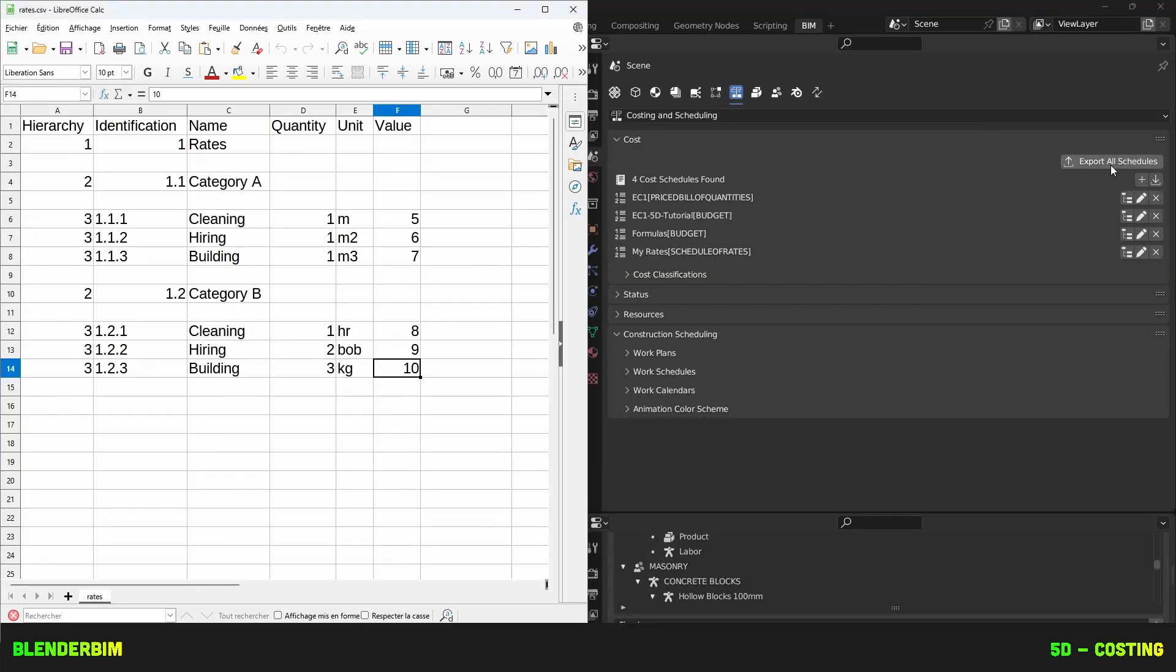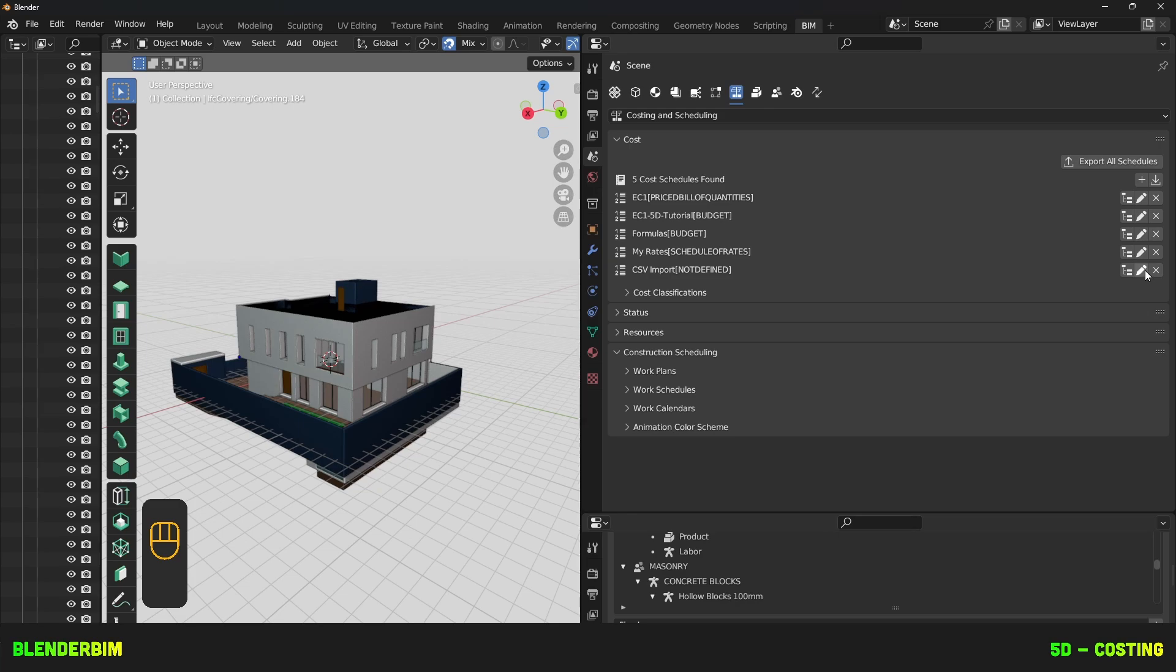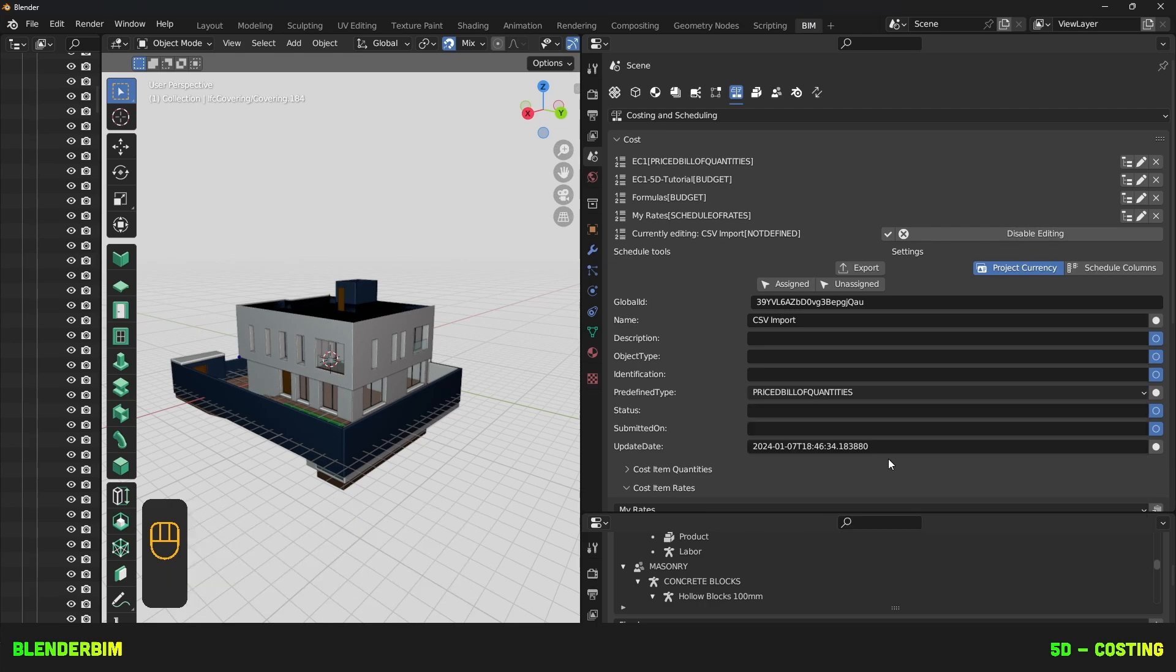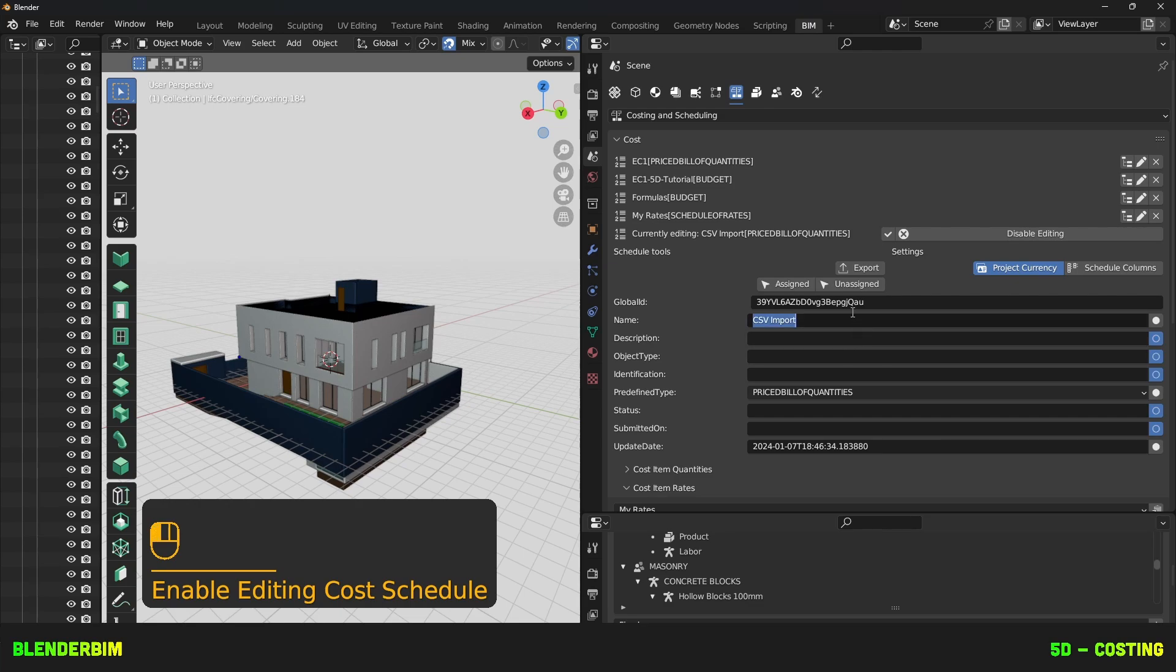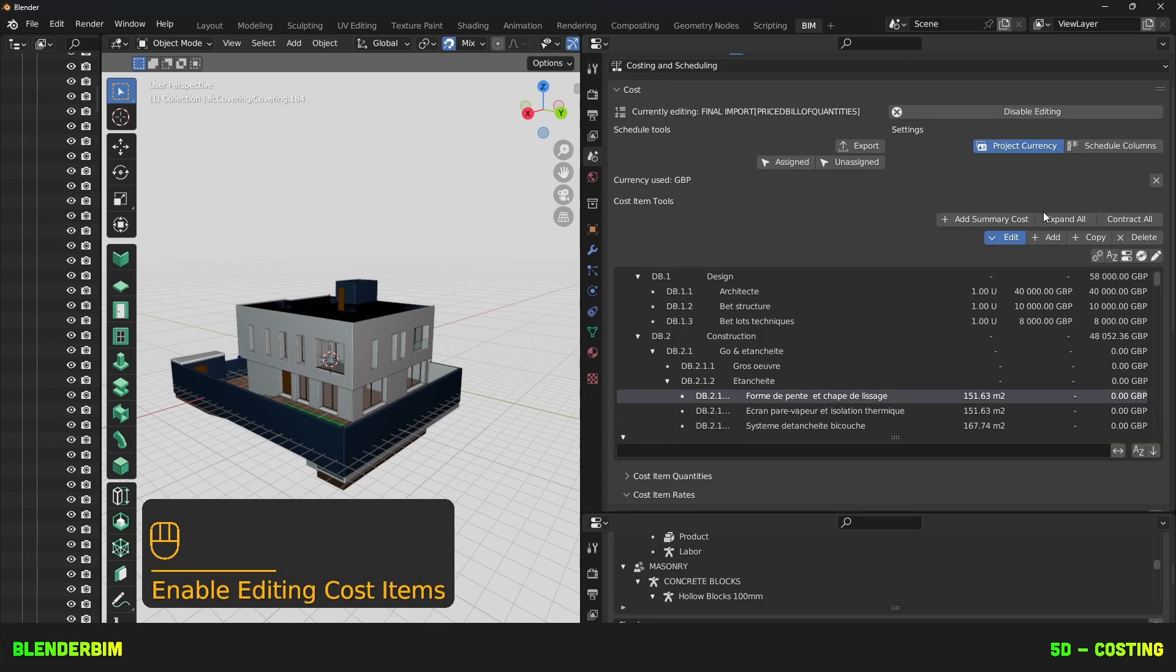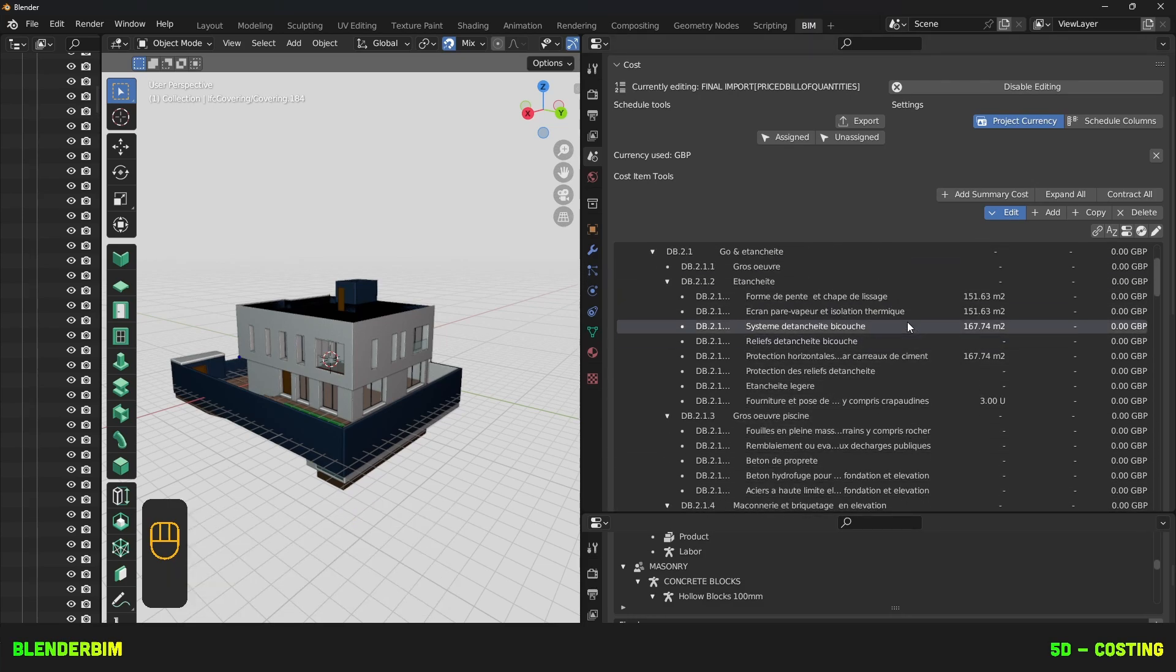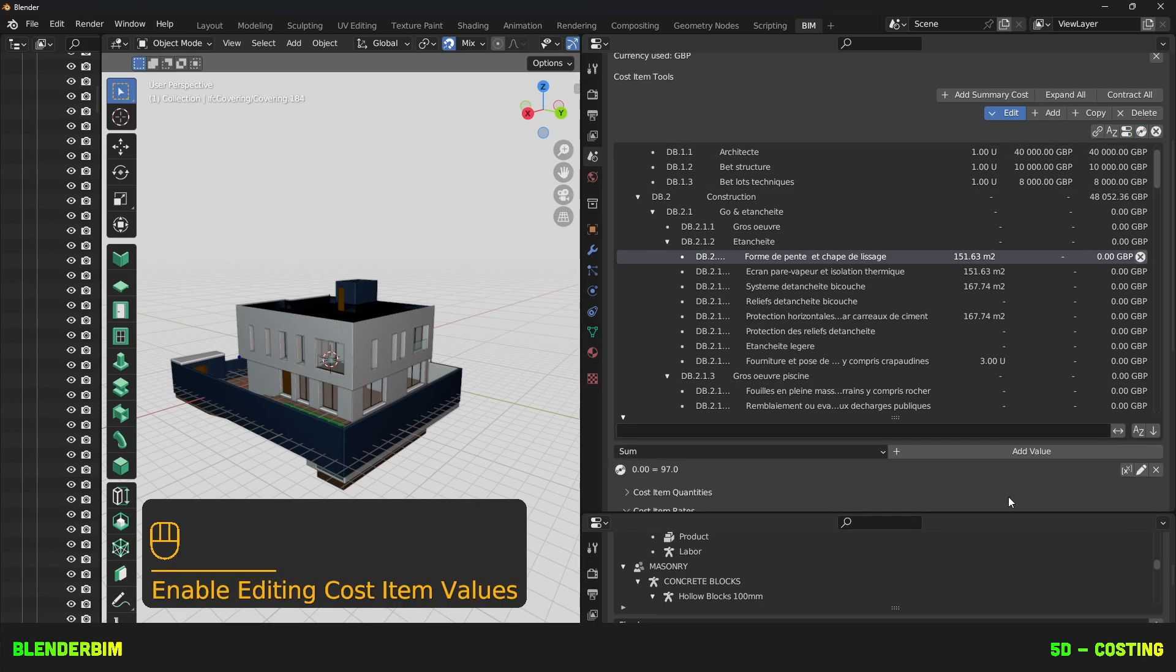So assuming you've filled out all of these columns correctly. And that you've saved this to CSV. Back in Blender BIM you need to import this. And this time don't press on schedule of rates. Import your cost schedule. Scroll down and here it is. We're going to change the predefined type to be a priced bill of quantities. Then also the name. Final import. I have too many schedules right now. And there we go. I think there is a small error. We don't see the costs here.